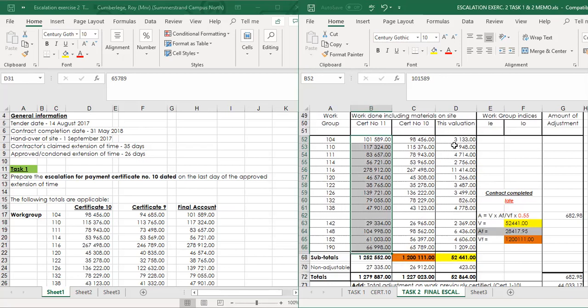Now note what is important here, and this is a good quantity surveyor because you've got no negative figures. And remember, if there were negative figures applicable in this column, it means that you've over-certified. All right, make sure, and that is important at practical completion, that you are 100% sure about the values. You don't want to come with surprises at the end of the day and have negative figures, which means you've over-certified, and there's a possibility that the contractor must refund the employer, which is not good.